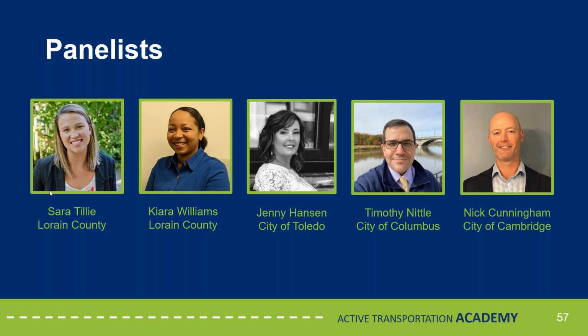I think that created some additional complications that you weren't exactly foreseeing. But one of the reasons why we worked with design and construction on our schedule is that, especially going through a federal project, there are always going to be hiccups, either having to satisfy our own other departments like public utilities or ODOT. So it flowed pretty smoothly. I'm just trying to pull the schedule for the project right now, but we also track all of our capital improvement projects internally on what we call a journey board. And so there are multiple opportunities just to check in and see what the status of design was.